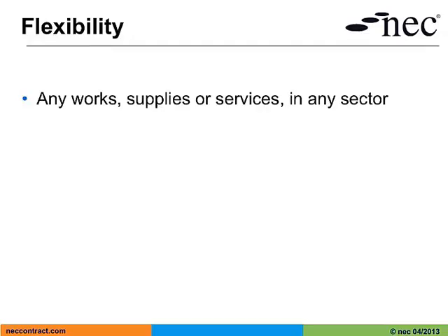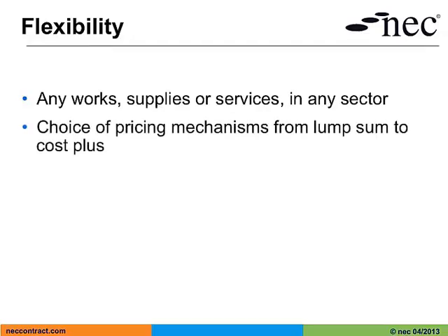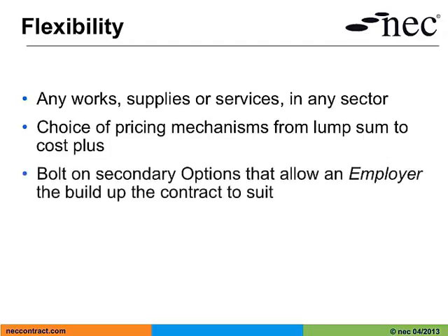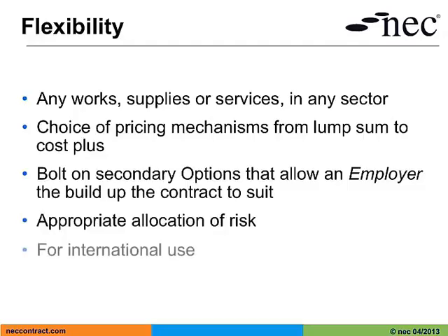They're flexible in that they give you a choice of pricing mechanisms from lump sum at one end of the risk spectrum to cost plus at the other end. There are then a series of bolt-on secondary options that allow an employer to build up a contract to suit his individual needs, and this allows for appropriate allocation of risk. The contracts are also designed for international use.